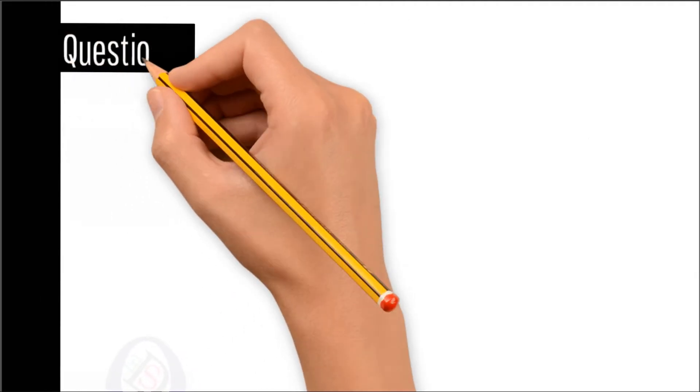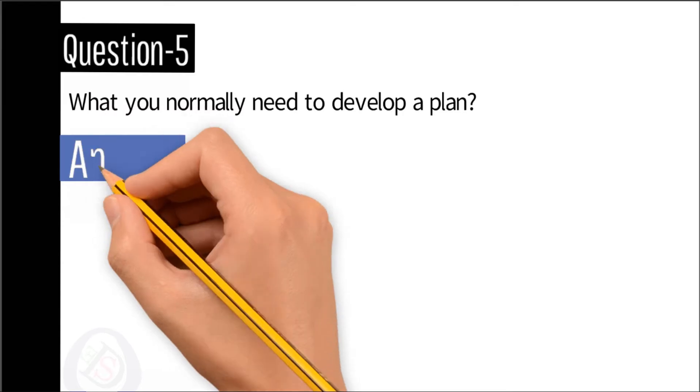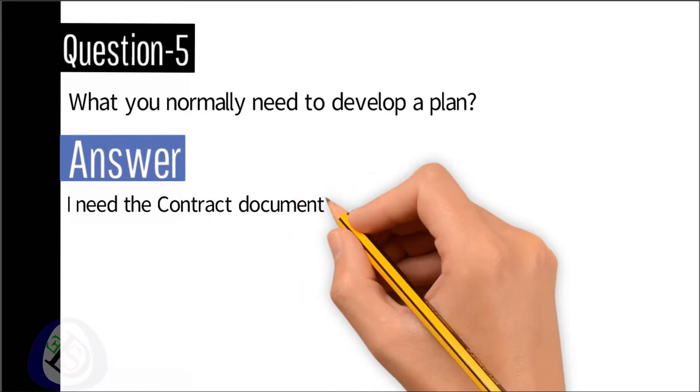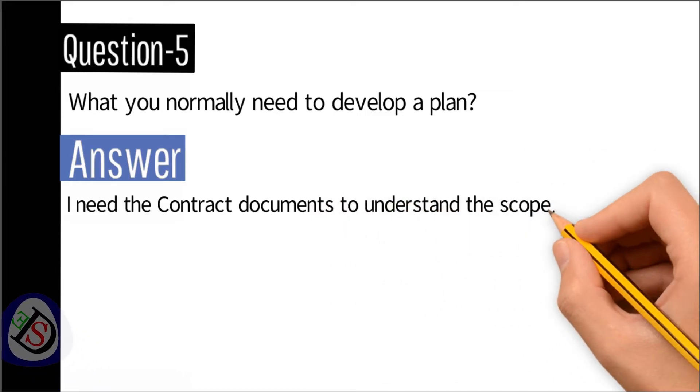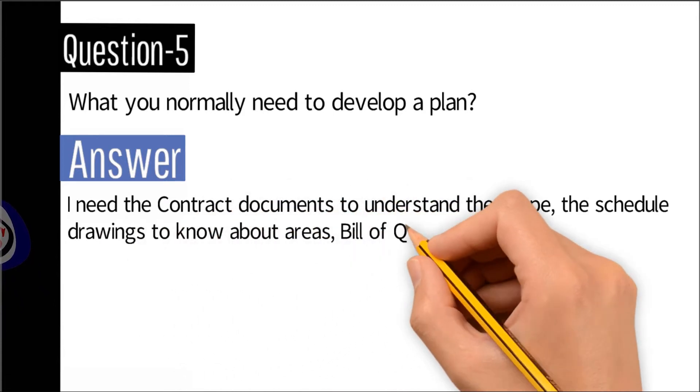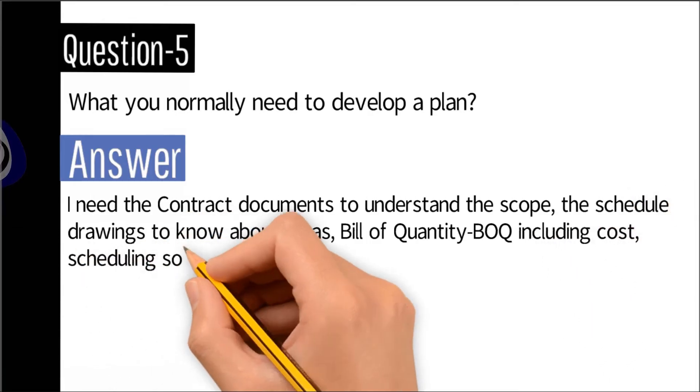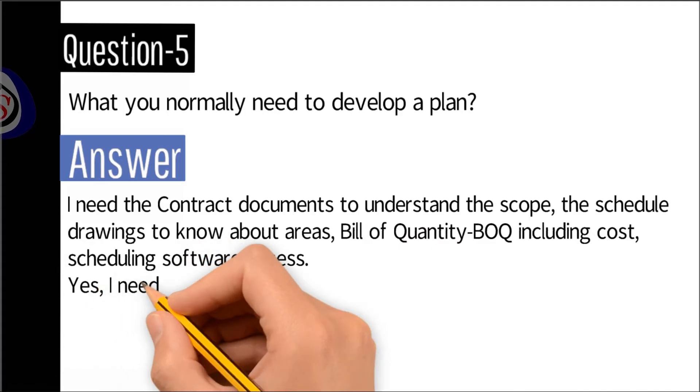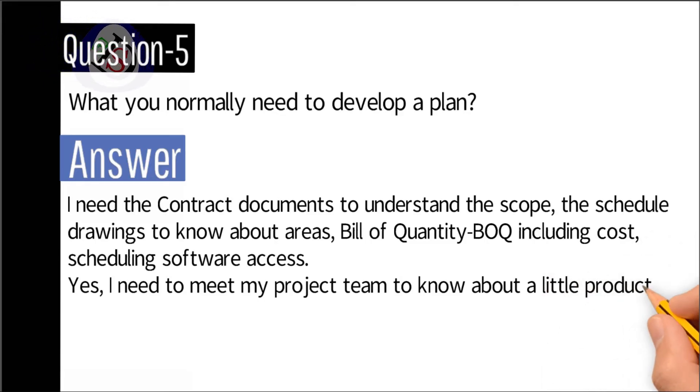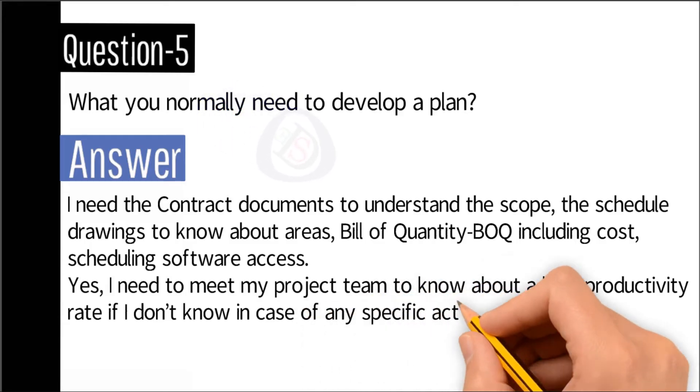Question number five: What do you normally need to develop a plan? Answer: I need the contract documents to understand the scope, the schedule drawings to know about areas, and the productivity rate if I don't know in case of any specific activity.